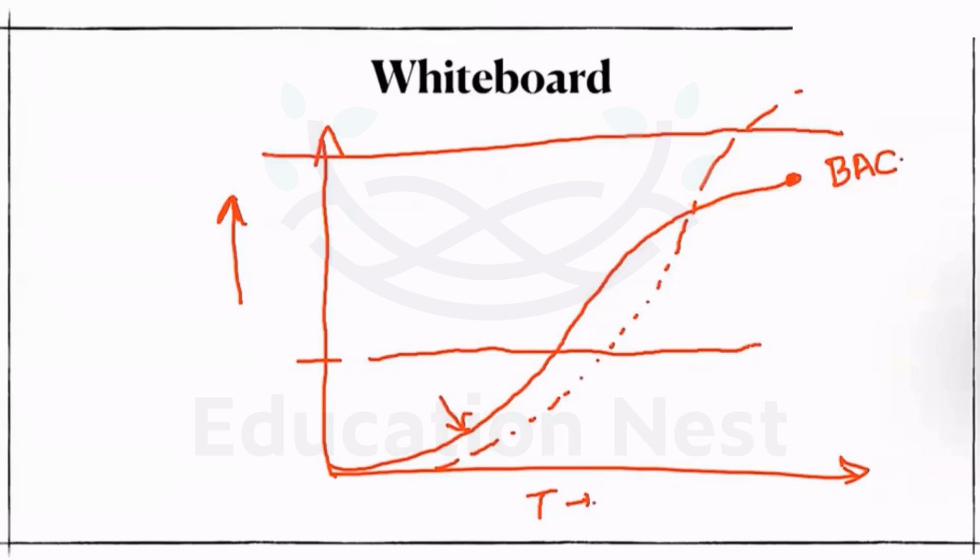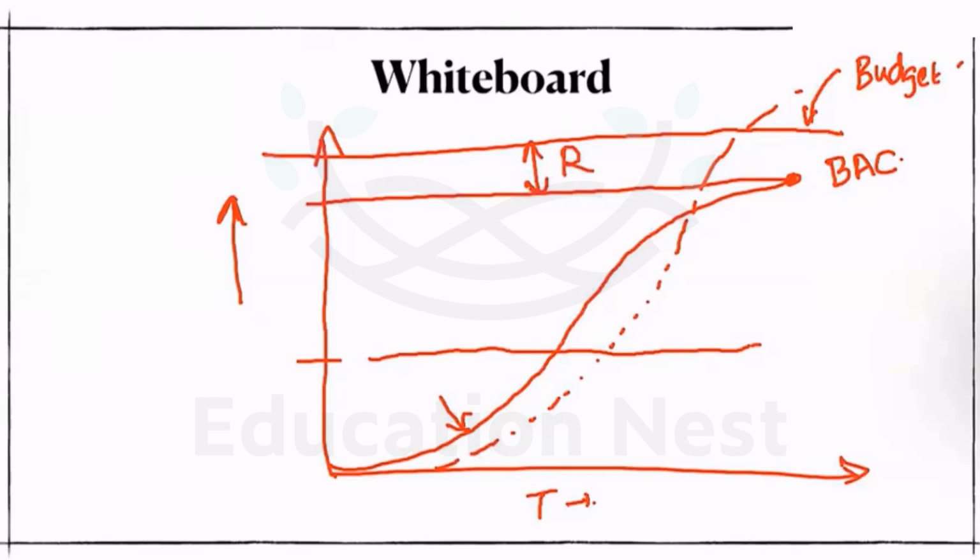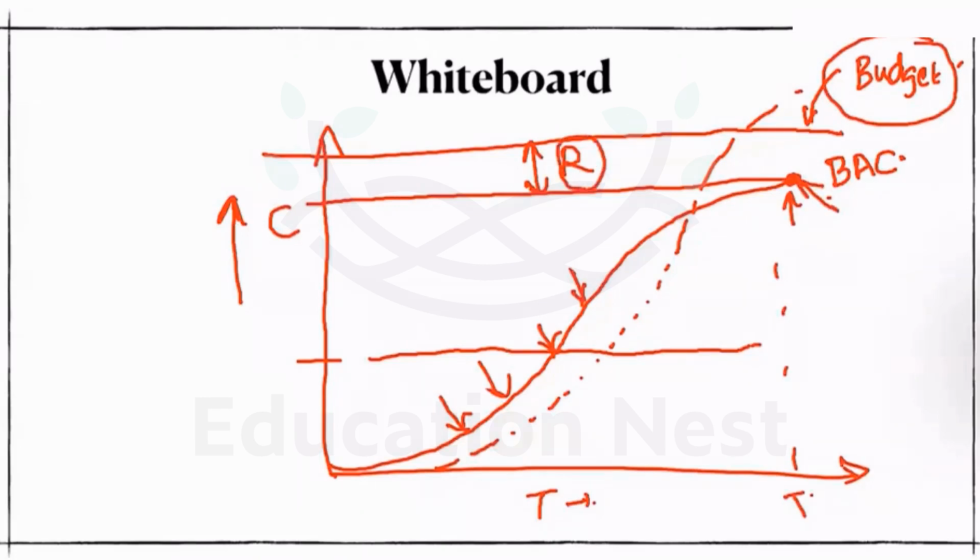So this is the final budget, and this is the reserves. So we know that with the estimation line, the project manager knows that at the end of the project, this is what I'm targeting as a cost, and also, of course, the time in the new emerging trends. But then the budget will be requested above this point. Why? Because we need to have these reserves that I'm talking about, the quality reserves.